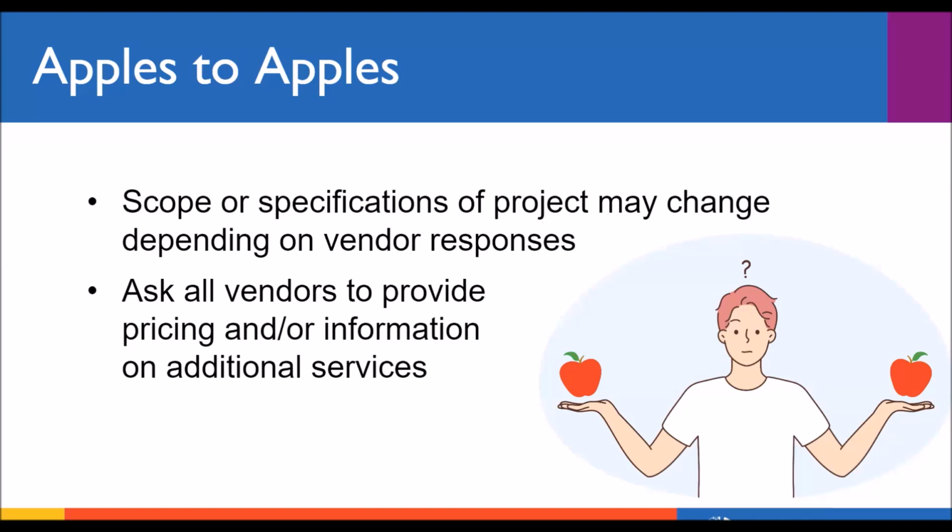It's also really important to not make assumptions because vendors can vary widely when it comes to this sort of conservation work or additional work. So it's important to understand upfront if and how this work would be charged for, especially when you're working with fragile, deteriorating material.